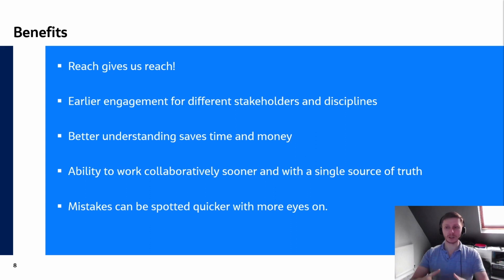And at that stage, a lot of time and effort has gone into design, and it's very expensive to roll back that clock. So rather than having a constant circle of iteration, we've almost got like a spiraling wave approach, where we'll do a little bit of design and then review it, and then a little bit and then review it. Instances of where we've already seen this come into play.